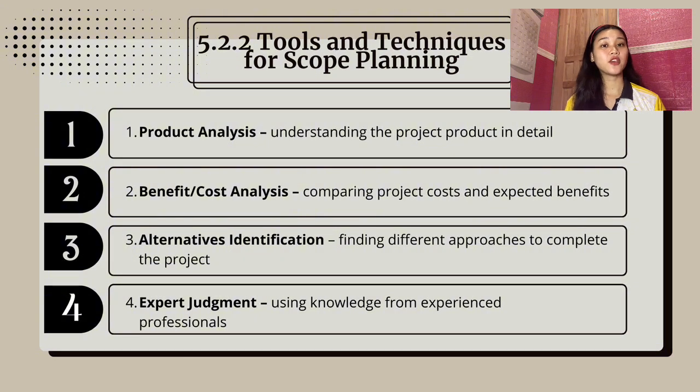Next is the benefit or cost analysis. Benefit or cost analysis involves estimating tangible and intangible costs and benefits of various project and product alternatives and then using financial measures such as return on investment or payback period to assess the relative desirability of the identified alternatives.